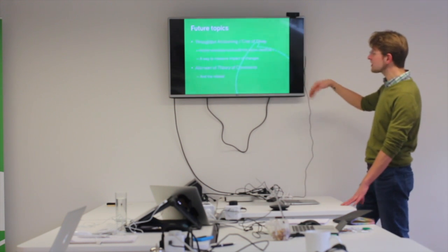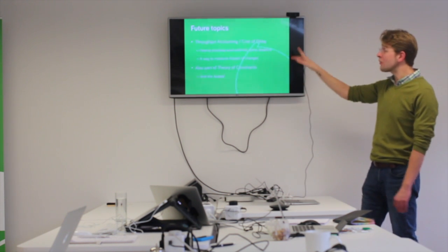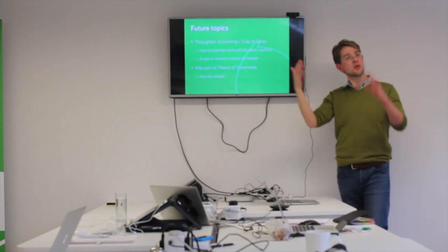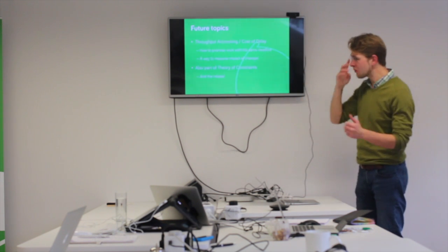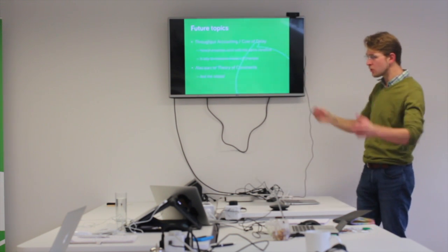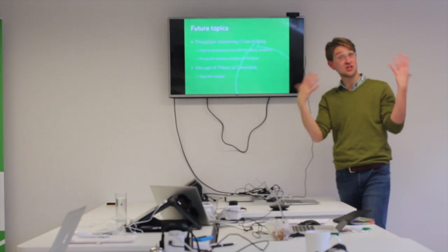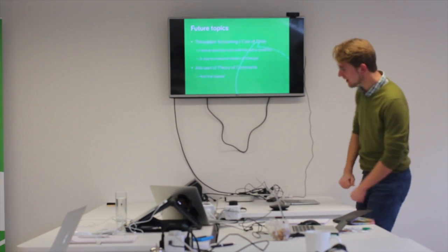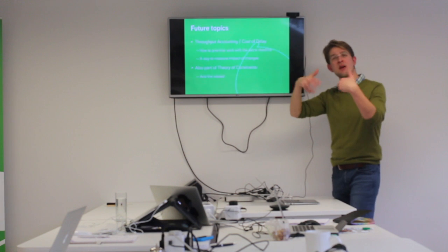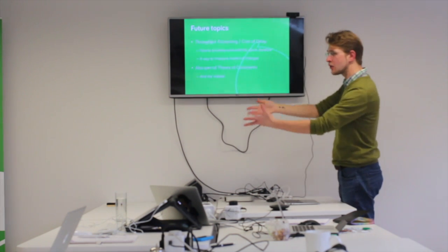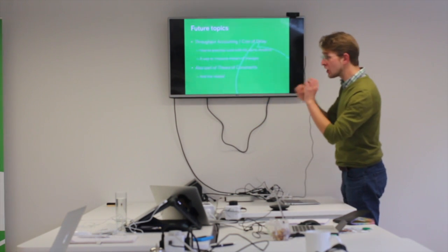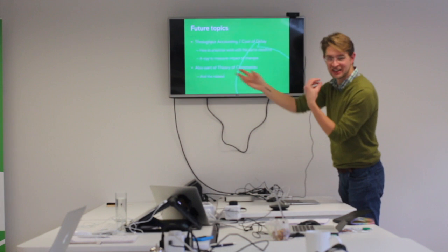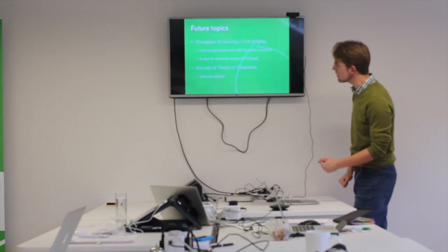A couple of things that tie into this: throughput accounting and cost of delay. So buffer management, this way of saying how do we make sure that work is moving through smoothly, how do we make sure that the bottleneck processes are always used as best we can, has those three zones. It is about prioritizing stuff that starts to land in the red zone so that work doesn't get delayed, and that the bottleneck is always in use.